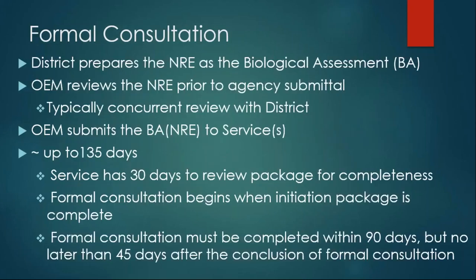For formal consultation, this is going to be required if we end up with an effect determination of may affect, likely to adversely affect. The district or the Turnpike prepares the natural resources evaluation as a biological assessment.